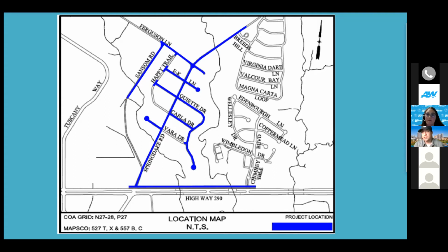So there'll be temporary asphalt to begin with, and then at the end of the project, as we come back and pave the roads, we'll pick it up, full width. So it'll be new. As you see throughout the phasing of the project, you'll see something temporary as we put the water line in and move to the next phase. And then we'll come back and start to pave everything that is required per the plans.